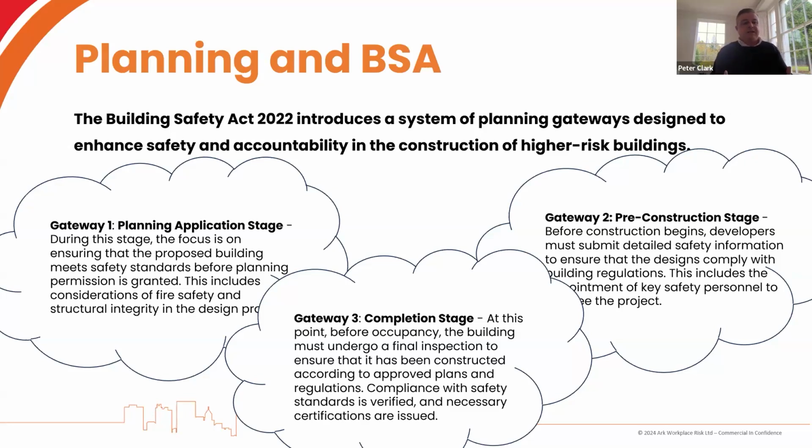So you think fairly straightforward exercise there to get those certificates and to review them with the fire strategy. And that is a straightforward exercise. But what we found with this was they'd given the documents for the wrong building, a simple mistake, but it was the wrong building. So without that verification, that building could have gone into use, actively into use, with no correct information. So again, what we're finding is that this happens more and more.